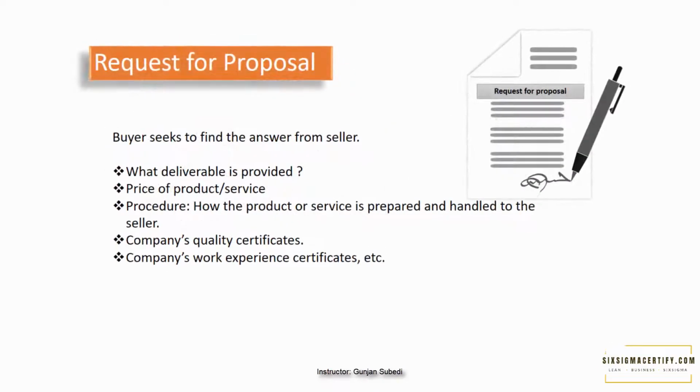Request for proposal. Here, the buyer asks the seller for in-detail knowledge on how the seller can solve the problem of the buyer. There are many things that are included as this is a detailed document. We could have information on what deliverable is provided, price of the product or service. We can have information on the procedure, how the product or service is prepared and handled. We could ask information about the seller's quality certificates or work experiences, etc.